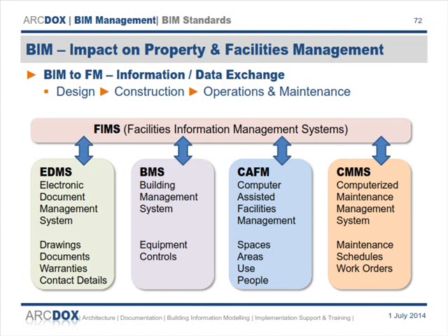What the UK government did, because they didn't want to be reliant on a particular technology or a particular software, was mandate COBie. COBie is developed in the US by the US Army Corps of Engineers, and it's a way to capture and record the handover data from the model.